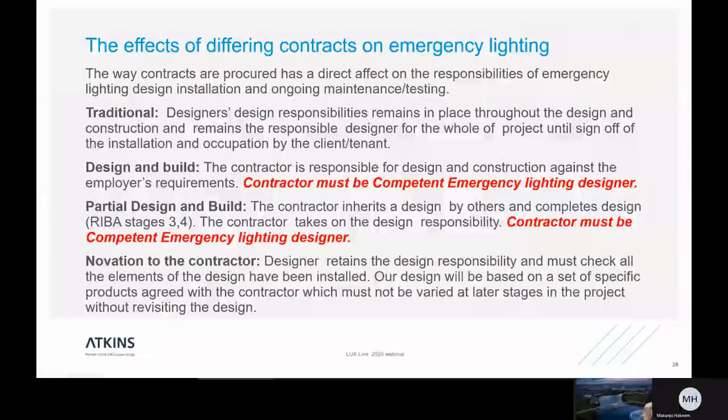So traditional contracts, the designer's responsibilities are easy. Design and build can be many types of contract, but the contractor must be the competent emergency lighting designer.